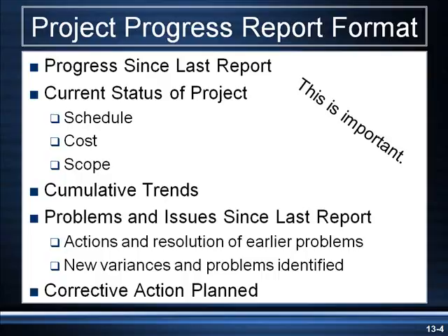The next thing we want to consider is cumulative trends. And these are trends that maybe we have a cost overrun, but it's because we spent too much money in the beginning on a single item. So we would be over budget. That's not a cumulative trend. A cumulative trend means it builds on itself. So if the cost of labor has gone up, we're over budget, but we will also continue to be over budget on a growing scale. So we might be 10,000 dirhams over budget at the moment, but by the time the project finishes, we'd be 30,000 dirhams over budget. So it's a cumulative trend.